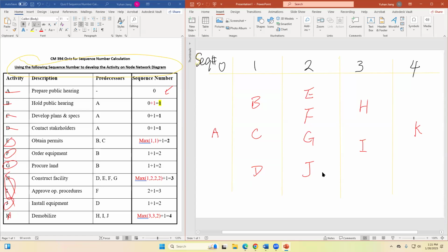So now we're going to link them together. When we're starting to link them, we should look at the relations from here. A has nothing before it, and B follows A, right? So that will be a pointer from A to B. Do we have a pointer from A to C?